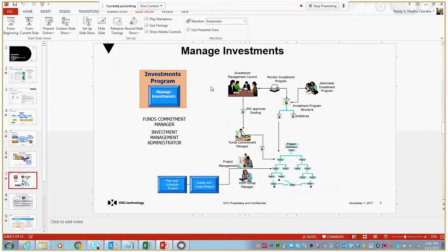So a capital investment project can be mapped with a work breakdown structure, that is, WBS element creation and a project creation. We can use the work breakdown structure to plan and monitor the project for constructing any fixed asset, like a building or structure. Here the settlement is carried out to the asset under construction or the completed asset.